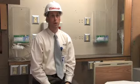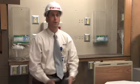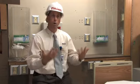In addition to the project coordinator that we'll work with here at the hospital, we also spend quite a bit of time with the infection control practitioner. In fact, Deanne around here is almost part of our crew. We see her a lot. She has the power to shut down a job site. If she sees a condition or something going on, or maybe the environment changed for some reason, she will come in. She's in daily contact with our on-site supervision, and she has that power because that power directly relates back to patient safety.